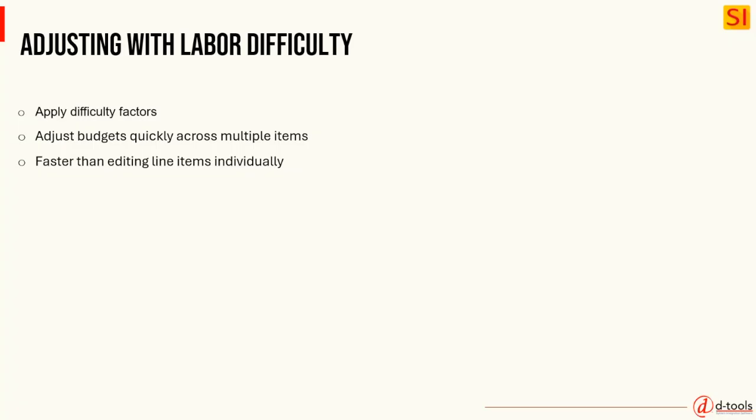But then we look at various factors in any given project, right? There could be issues like the construction type, the materials. Is it a concrete building? Is it wood framed? Are the ceilings 10 feet? Are the ceilings 14 feet? Right? There might be various reasons that we can identify while we're quoting the job to help us think about difficulty.